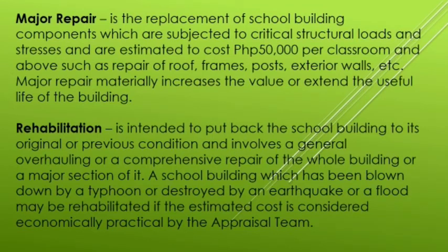Major repair is the replacement of school building components which are subjected to critical structural loads and stresses and are estimated to cost 50,000 per classroom and above, such as repair of roof frames, posts, exterior walls, etc. Major repair materially increases the value or extends the useful life of the building. And now let us also have the rehabilitation.